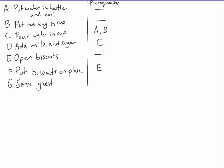Putting the biscuits on a plate, that would rely on me opening the packet first. And then serving the guest, I need to have everything else done to do that. So I need to have D, which was adding the milk and sugar to the tea, and E, putting the biscuits on the plate. So that's a precedence table, which shows what different parts of this procedure rely on previous parts.